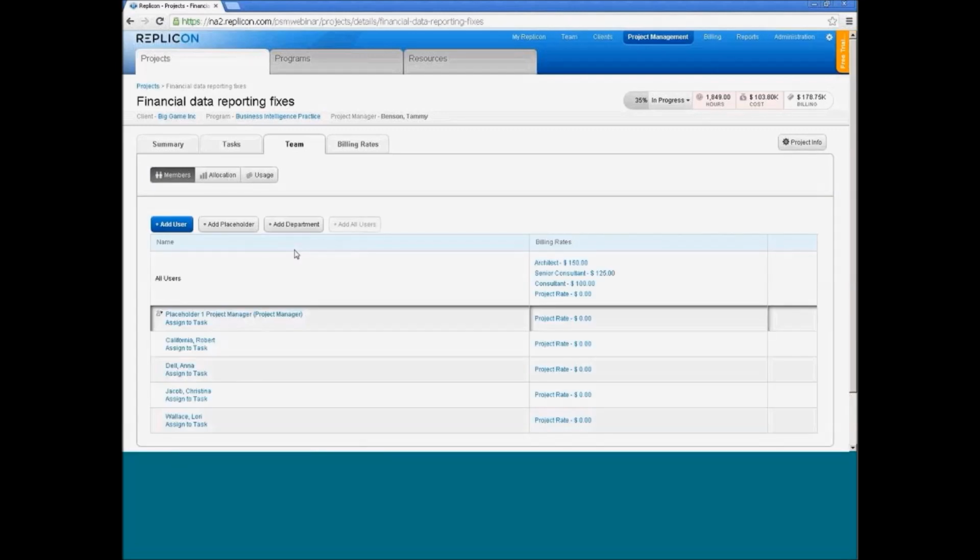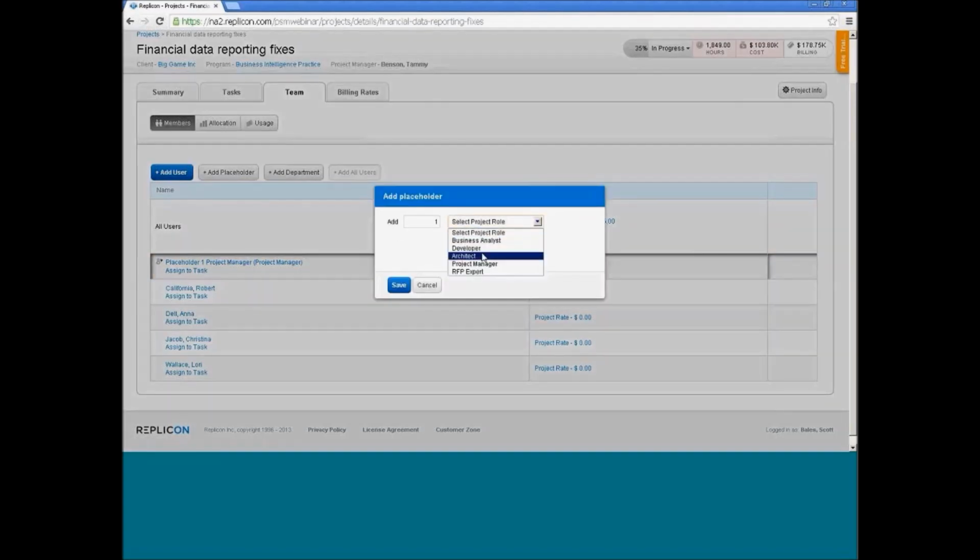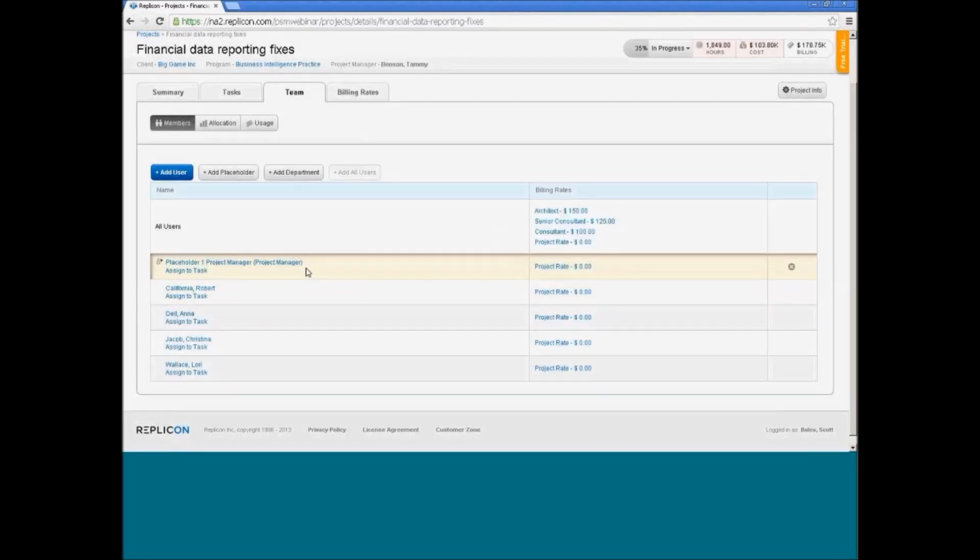And the Team tab corresponds to the team frame, if you're familiar with the team frame on the Edit Project screen today in Gen 2. One initial difference you're going to notice is this special type of team member called a placeholder. The system does support now the ability to assign a placeholder. And a placeholder is a specific role based on your definition of these roles that you need to fill on your project with the user. Depending on your workflow, your product or project managers may log in and put all placeholders on the project, and then a resource manager comes in after the fact to associate specific users, and that can be used and leveraged through the placeholder capability. Okay.